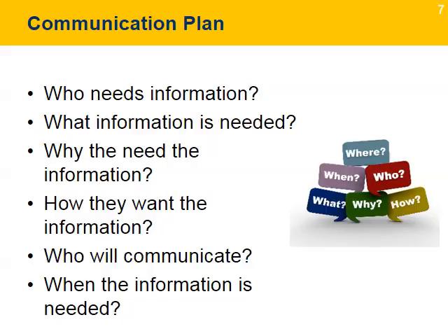The communication plan also describes how the project will communicate with internal and external stakeholders. Its main purpose is to determine, document, and plan the communication needs of the project and its various stakeholders. It's a document that answers the following questions: who needs information, what type of information they need, why they need it, how they need it, who is responsible for communicating, and when they need it. Depending on the size of the project, the communication plan can be small or very detailed, but it's a responsibility of the project leader to develop this plan and implement it.